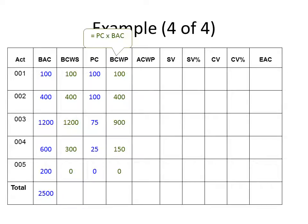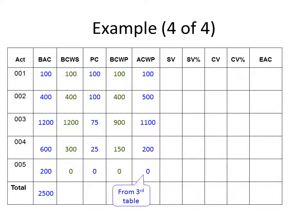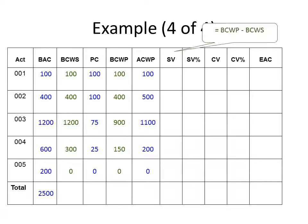The site staff also reported the actual money spent on each activity, so we load the actual cost of work performed (ACWP) table from the field data. We now use these figures to calculate schedule variance. Schedule variance is computed as: budgeted cost of work performed (earned value) minus budgeted cost of work schedule (planned value). The schedule variance for activities one and two is zero, meaning we are on target as far as time is concerned.